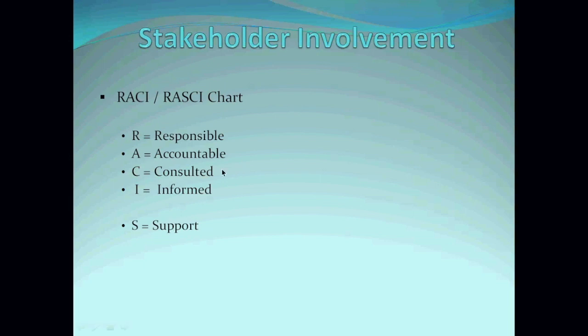And where you have accountable, depending on whether we say responsible for the overall or accountable for the overall project. So what we usually have is a table with an R column, an A for accountable, C, I, and sometimes you could have support as well. If the project involves people that will provide support to you, you can have a column for support as well.